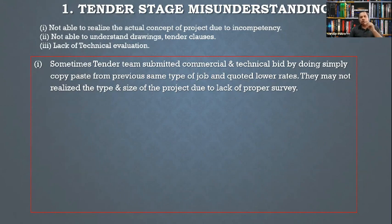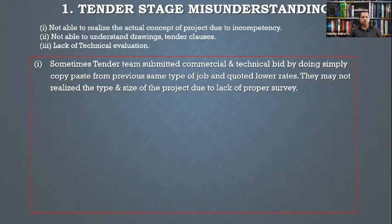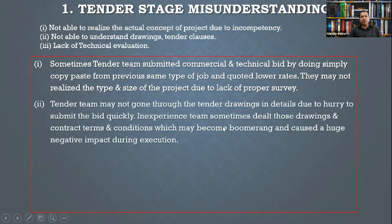For example, in one airport project, there was a package called a titulator. This was mentioned in the contract document, but the tender team did not go through it properly and may not have known that system. At a later stage, there was a huge cost impact because they had not included that package's value in their budget — the project went negative. This kind of oversight happens because tender teams rush to submit bids quickly without reviewing tender drawings in detail.